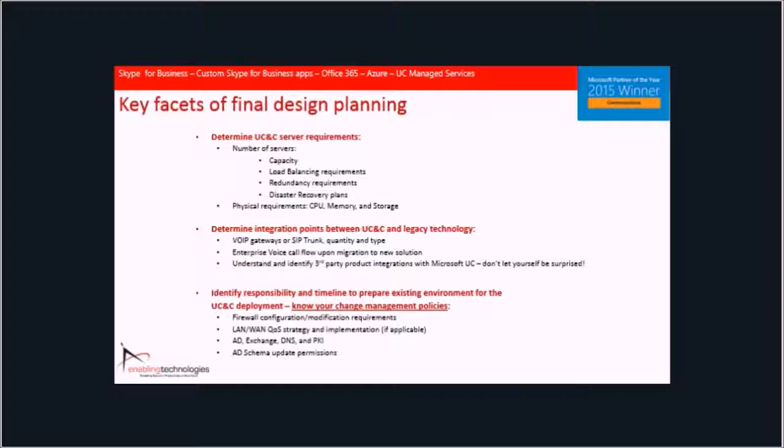Lastly, and the underlying part's the most important one here, is understand your change management policies. I find that with Skype for Business deployments, sometimes folks don't understand their change management policies as well as they might think they do. So get out in front of that. Have those conversations around the security considerations, whether it's the DNS, the certs, the firewall ports. Make sure you understand your QoS strategy. Make sure you understand if you have outage windows in your environment, when those are, and what sort of lead time you need to put forth to get into that window. Don't let this be a bottleneck for you throughout your project.